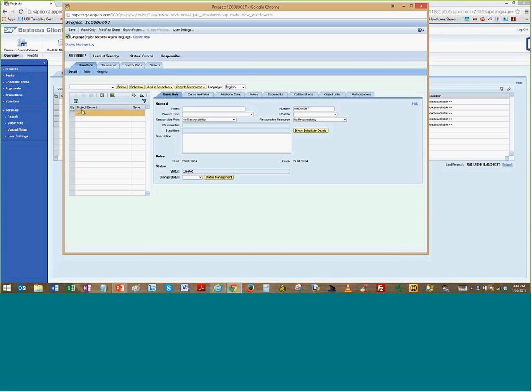Up to you guys. See our project, as you can see, we've got a project element created, but it's got no name to it. So we're going to give it a name: Phase 1 cProject Training 1. Okay? There's a bunch of different stuff here. Project type you're going to have to select. Right now, if you save this project, there's nothing else we can do because we haven't associated it with a project type. In the production environment, we will have agreed upon project types available to us.